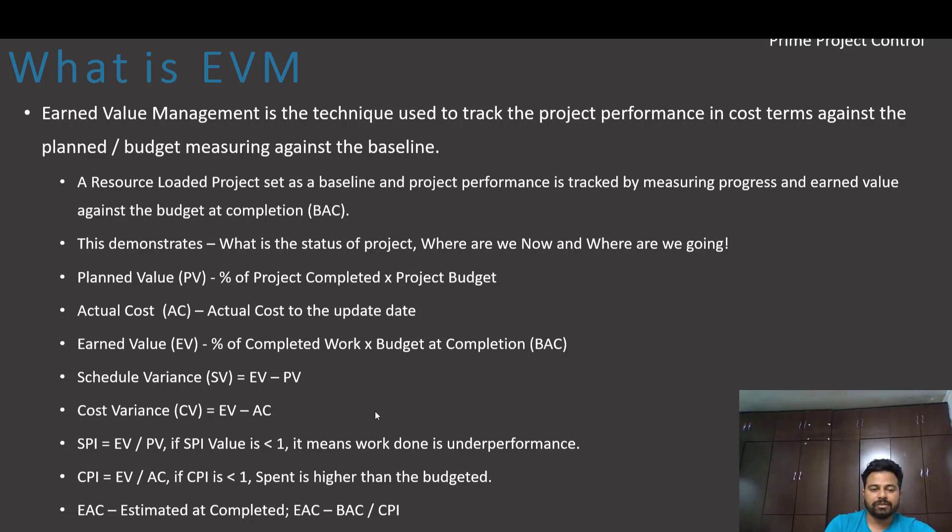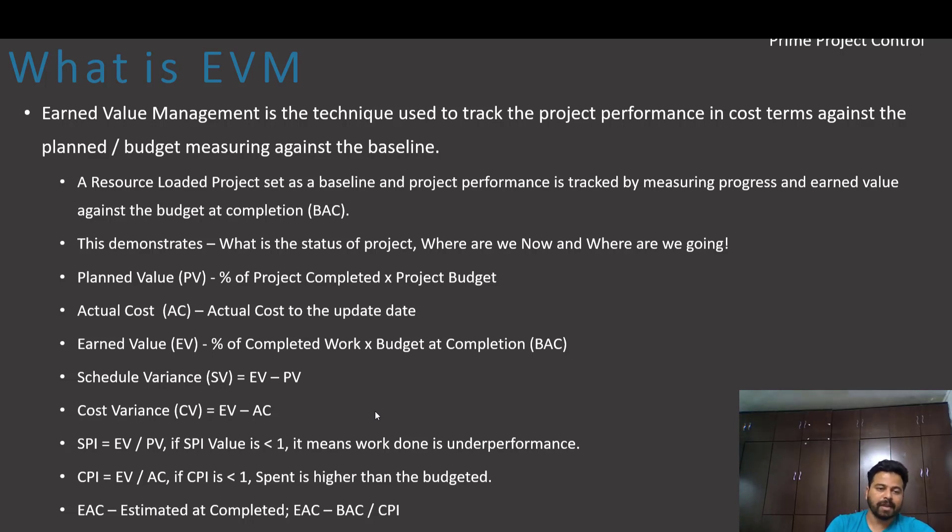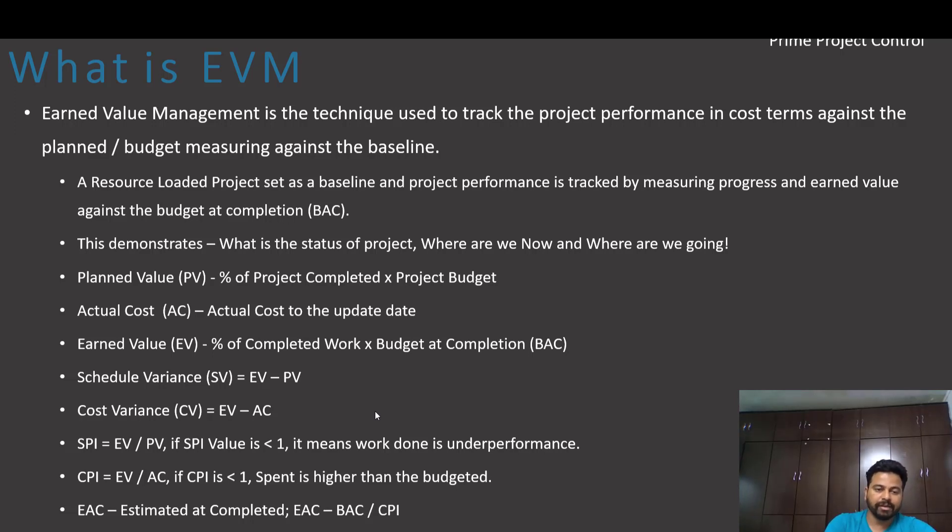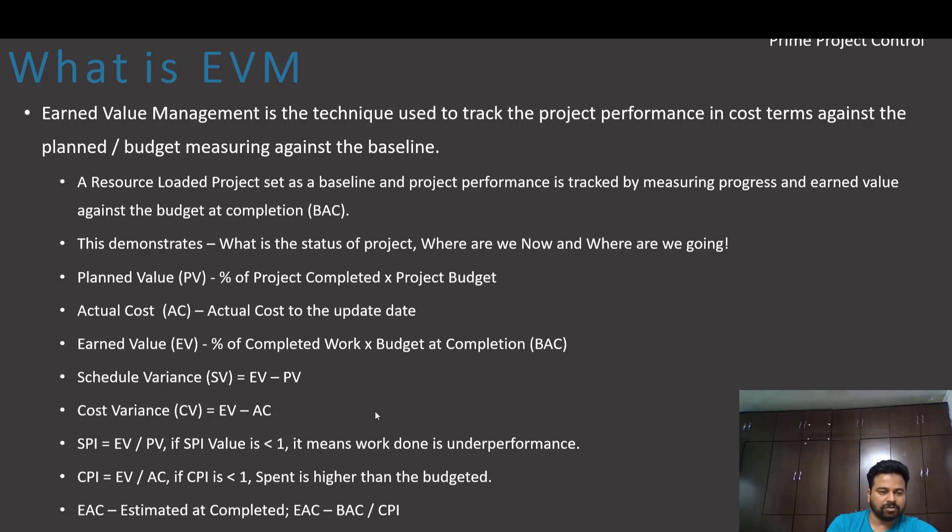Earned Value is percent of completed work into budget at completion. These are the Planned Value PV, EV, and AC. We call it AC means Actual Cost, PV means Planned Value, EV means Earned Value. We will measure against PV and EV to get a schedule variance. Earned Value minus Planned Value is schedule variance. Earned Value minus AC actual cost is cost variance.